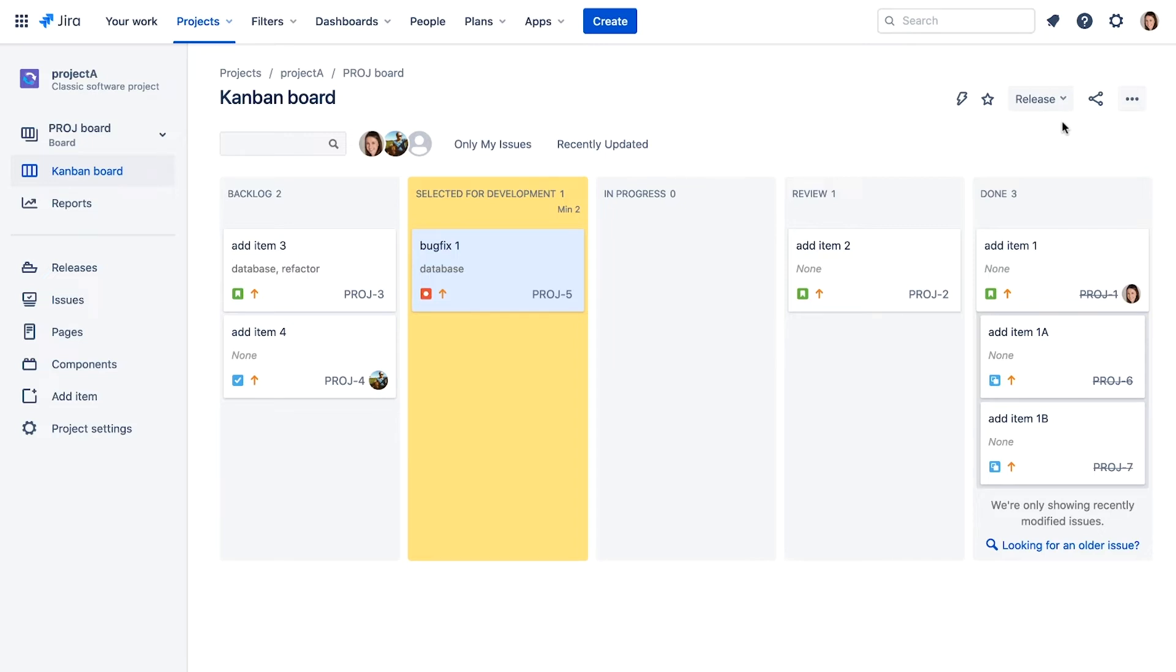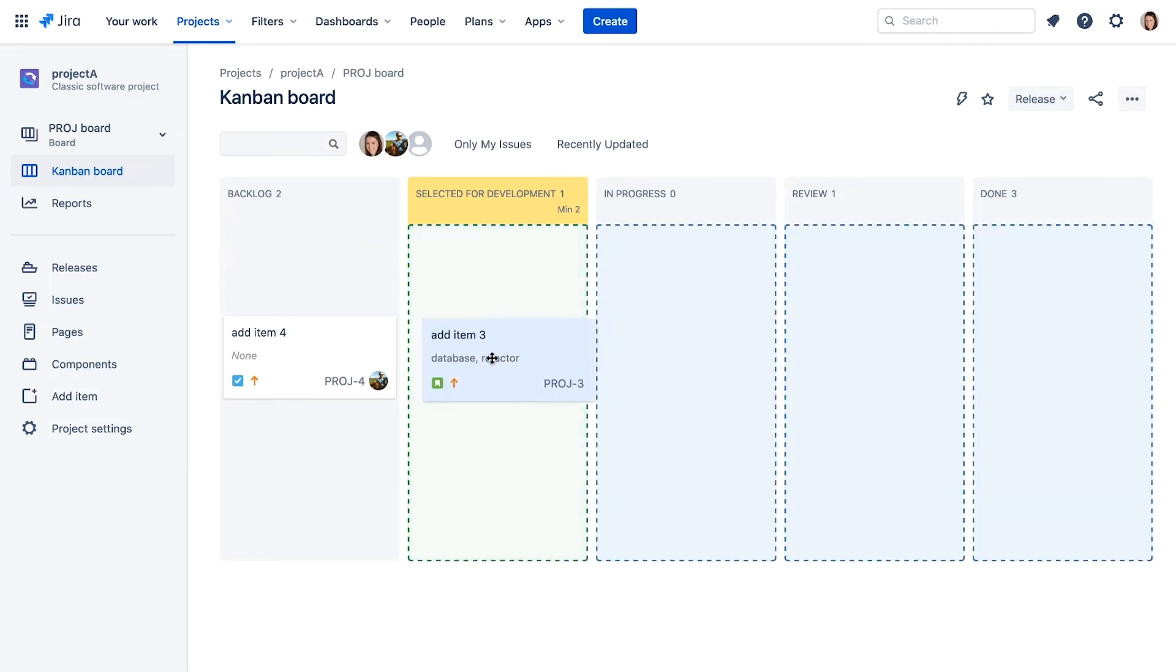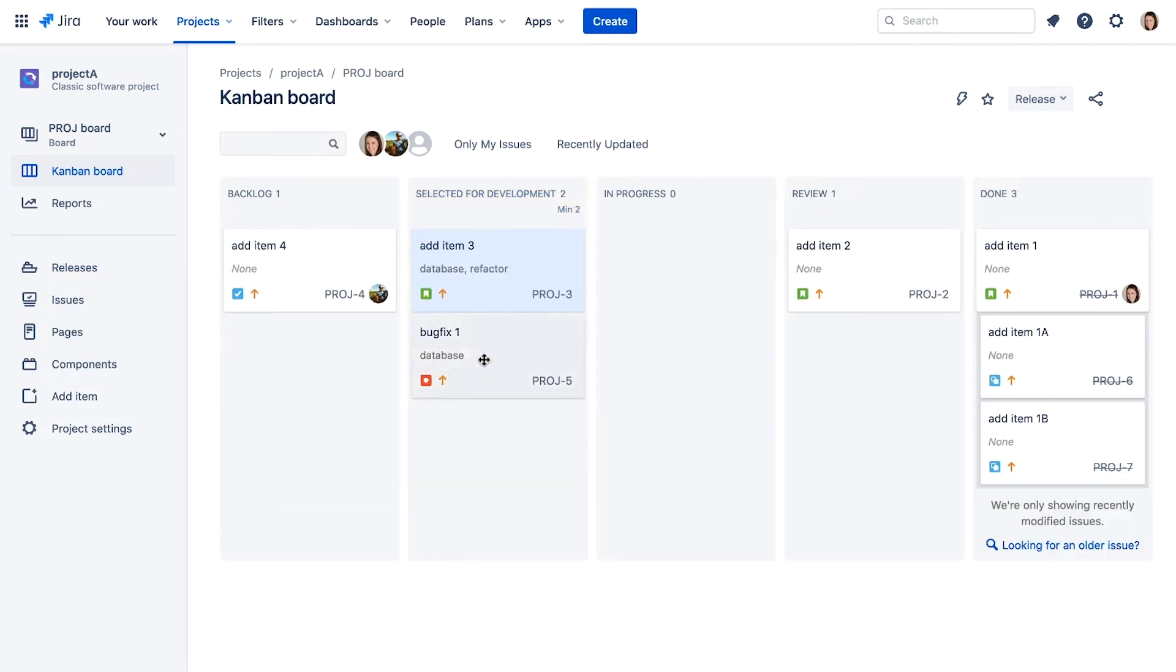Because the work progress limit is violated, the column is highlighted in yellow. When we move an issue to that column, it resumes its normal appearance.